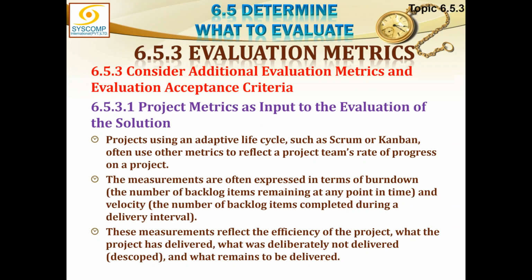But for example, they could not accomplish it. They could only accomplish 20. So then they would know that their capacity is 20 story points. Next time, they will be picking up from the product backlog only 20 story points' worth of user stories. Did I make myself clear?